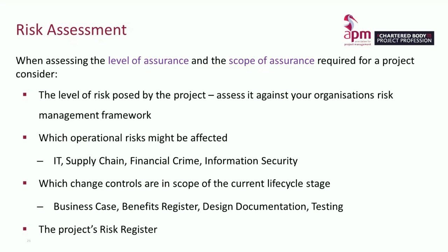They are the level of risk posed by the project, and this should be assessed against your organisation's risk management framework. Which operational risks might be affected by the project or the changes being implemented. They could be IT risk, supply chain, financial crime, information security, or many others.